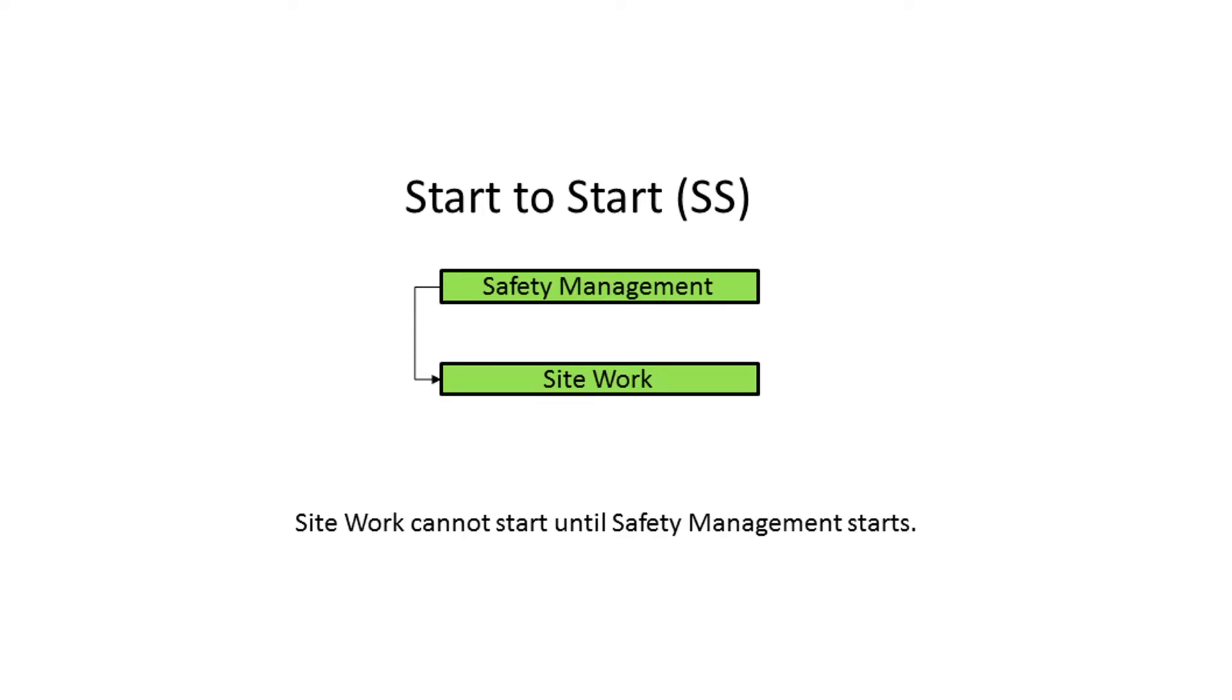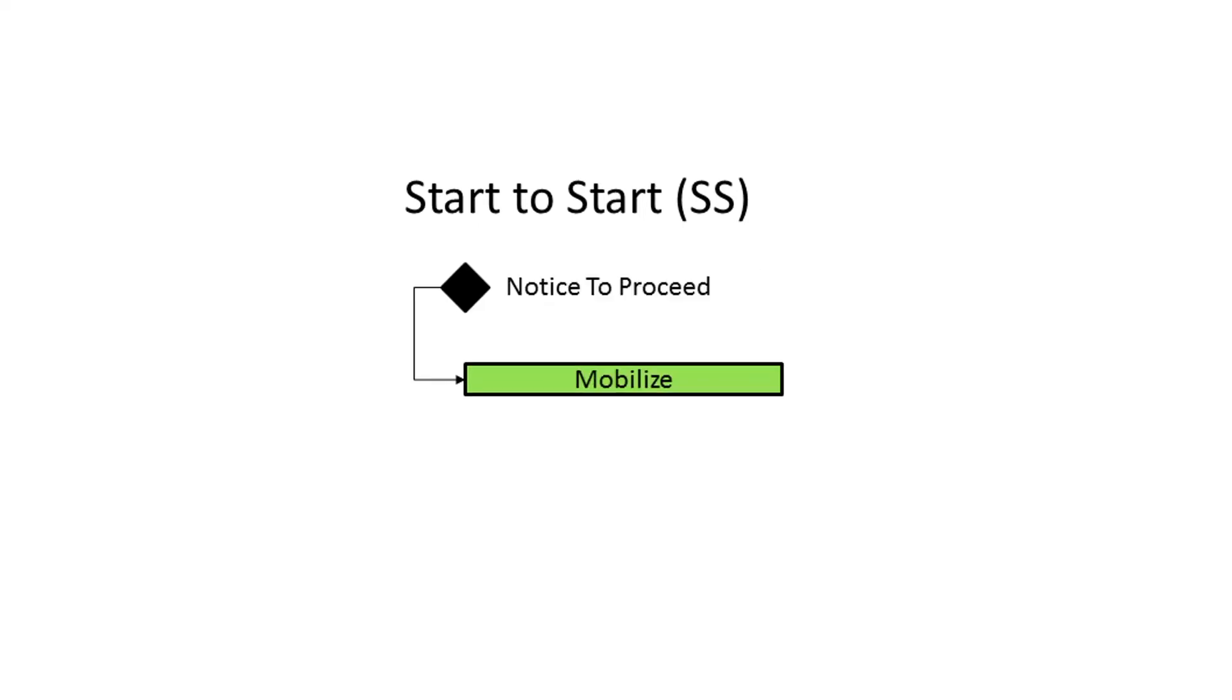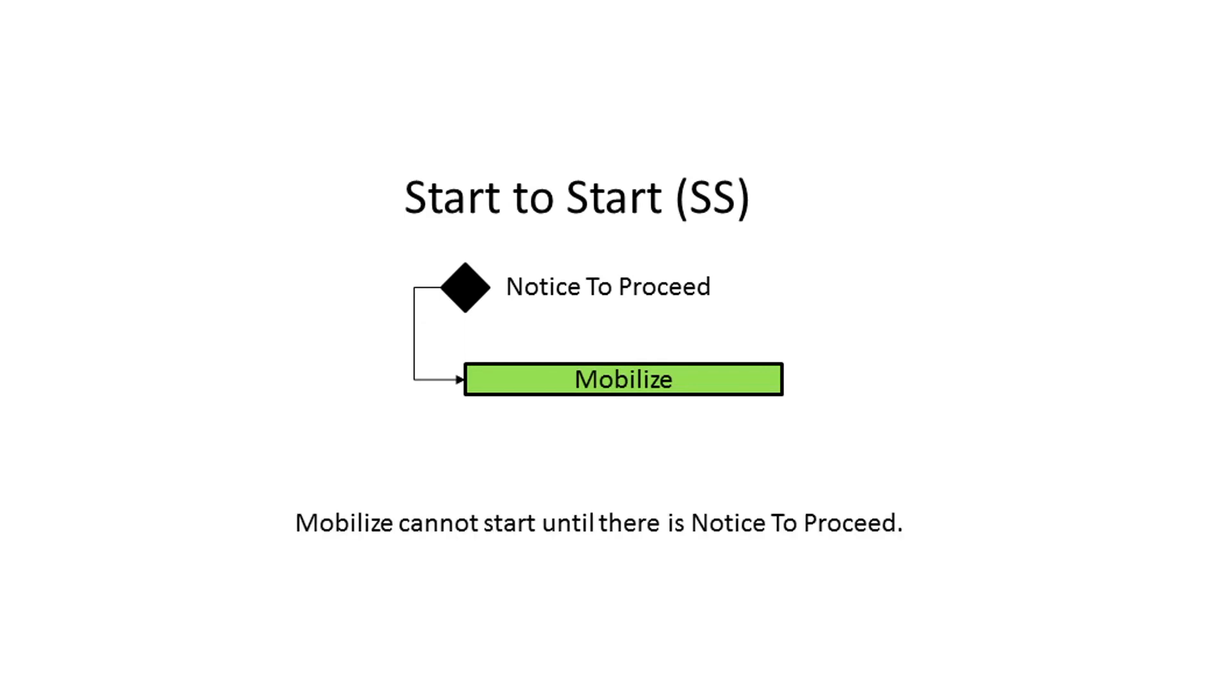In P6, start-to-start relationships are often used to link start milestones. Start milestones only have a start date in P6, so use of a start-to-start relationship is appropriate and commonly performed by P6 schedulers. In this example, the start milestone called notice to proceed and the mobilize activity have a start-to-start relationship. Mobilization cannot start until an official notification to proceed is received from the customer.